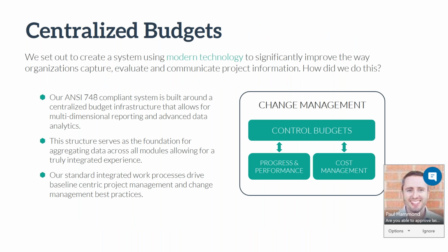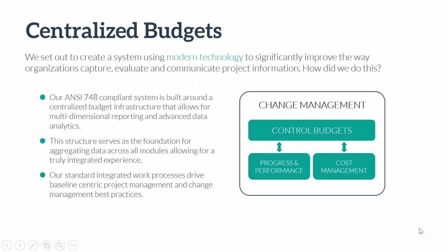Performance ratings, commonly known as performance factors, suffer and a trend is established, signifying an overrun on the budget. A change order could be approved to cover the cost overrun, or the work is simply not completed. This simple constraint helps ensure that there is a balance between scope and budget on a project, and eventually helps to keep a project in line, performing to expectation.